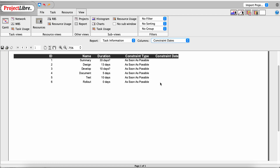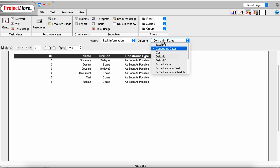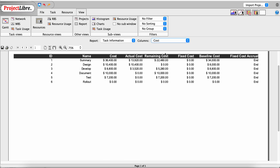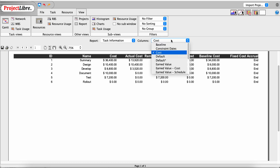There's also a Constraint Types report showing constraints such as as soon as possible, as late as possible, start no earlier than, and start no later than — so we can see all constraints on these tasks. The Cost view has the task name, cost, actual, remaining, fixed baseline, and fixed cost accrual, which can be set to accrue at the start, middle, or end of a task.